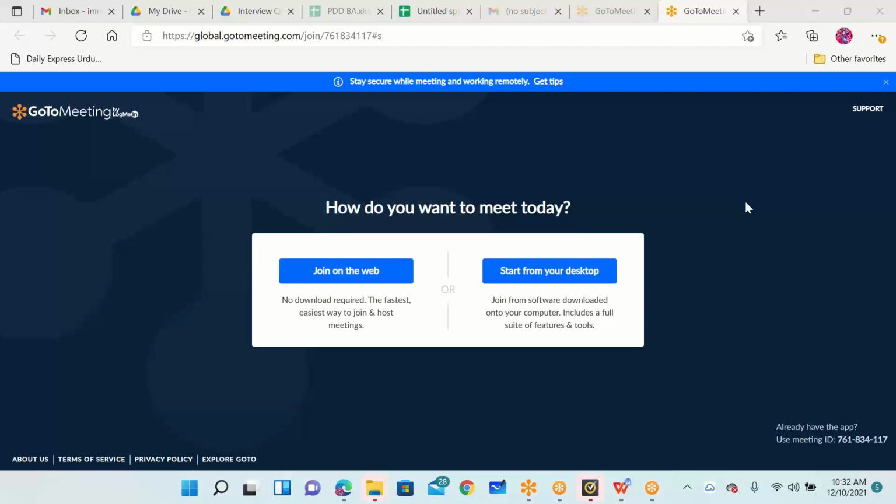Same way, in the second, third, fourth sprint, if there are small things which keep on coming, you might have a pile up of the whole thing, and then they can have an extended sprint especially to cater to all those changes. So a separate sprint would be run to cater to all the functionalities that need changes. Same time, once you are going through your sprint, there would be some defects and bugs, some issues coming, and you will see sometimes a parallel sprint running only for fixing the bugs.